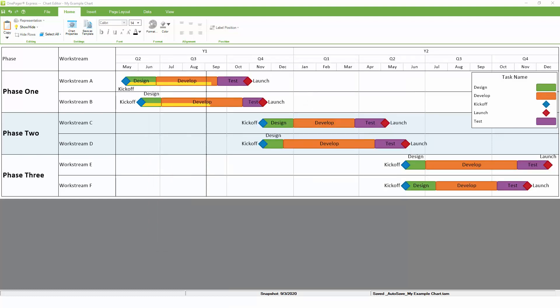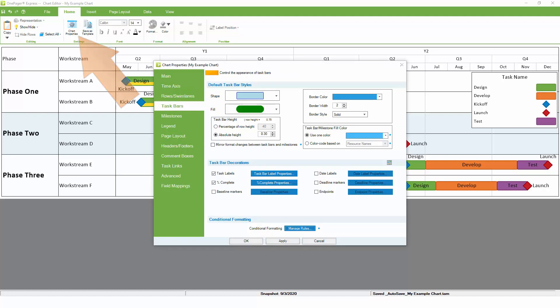Conditional formatting is not limited to only color. It can also be used to assign shapes instead, which is especially useful for milestones. Currently, all of the milestones in our chart are diamond shapes, but we can assign different shapes to different types of milestones conditionally.